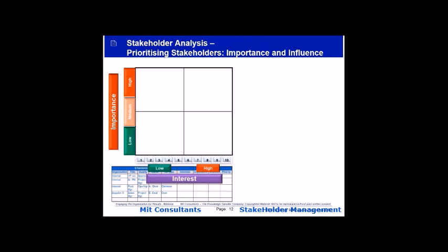Now, as we're doing these meetings with individuals or exchanges with individuals, and maybe guided by other people within our structure, we want to be able to have an idea of where these stakeholders fit in a very simplistic but very powerful matrix of importance and interest. Importance, we're really talking about organizational position. Importance could well be obviously the drivers would be very important behind that. It could also be the famous deliverers, organizational operational units that will be receiving the product and service.